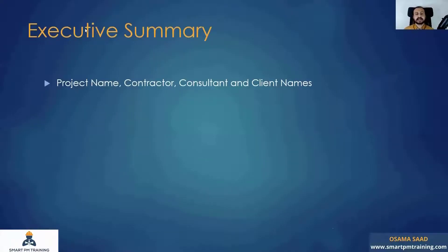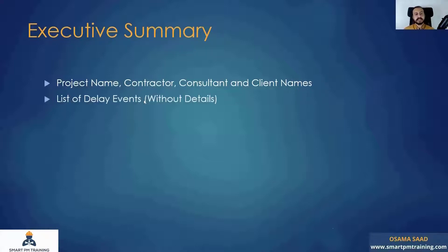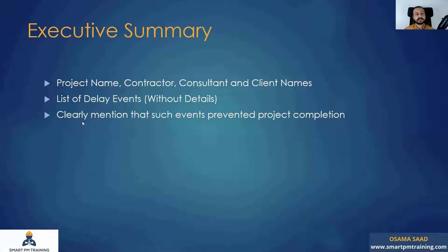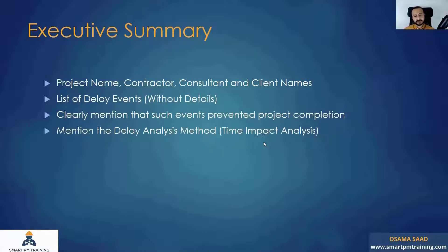In the executive summary, write the claim for anyone, even if they have no prior knowledge or familiarity with the project. Include the project name, contractor, consultant, and client names — even though we all know them. Provide a list of delay events without full details, since those are covered later in the claim. Clearly mention that such events prevented project completion. State the delay analysis method used — for example, Time Impact Analysis — and explain why you used it.